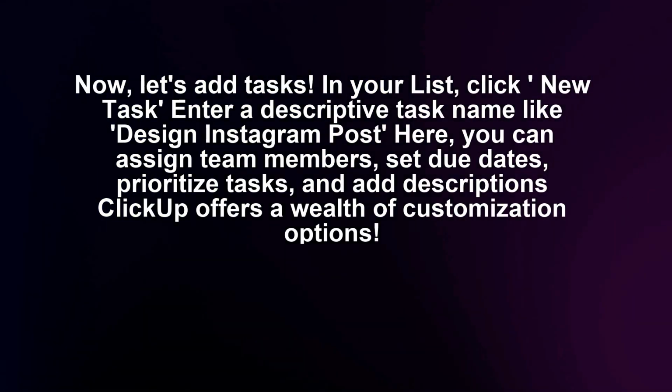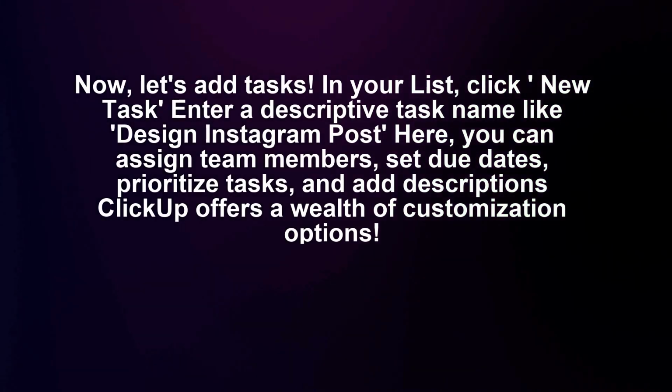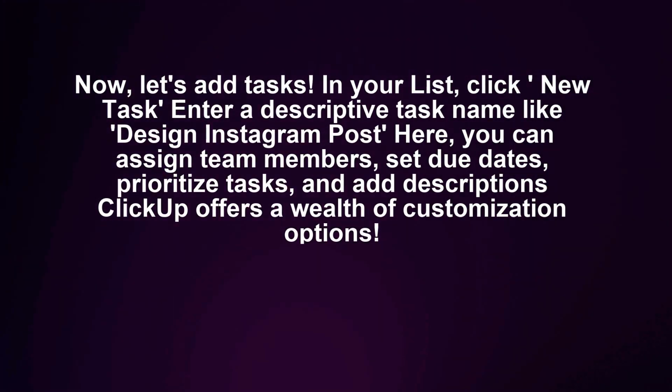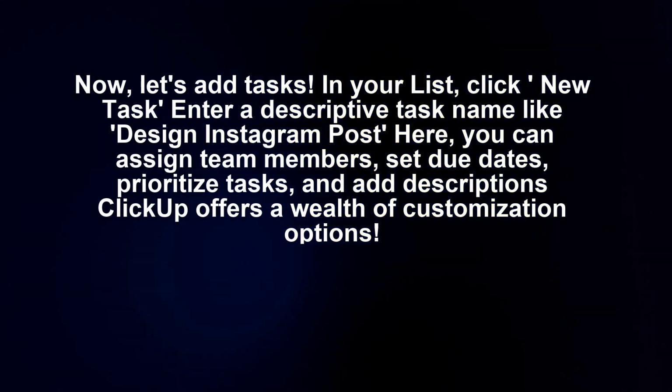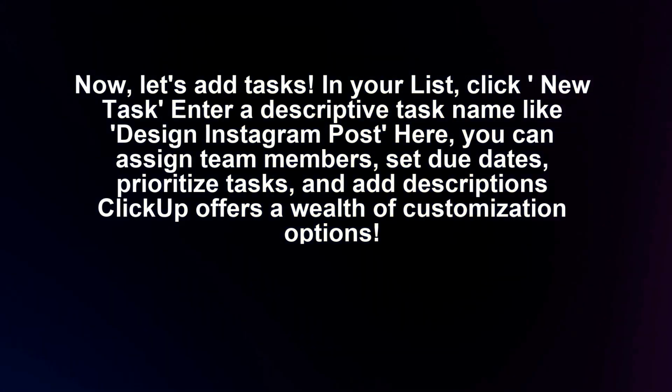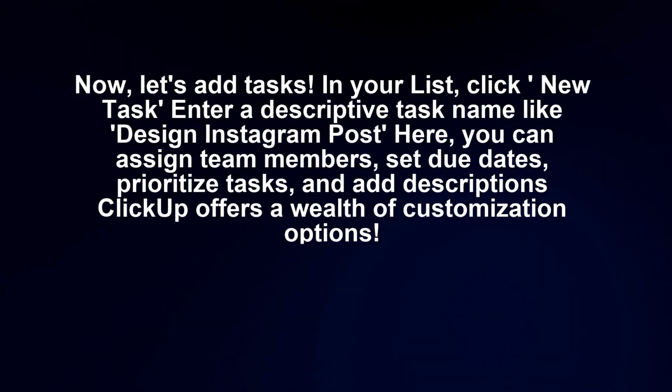Now, let's add tasks. In your list, click New Task. Enter a descriptive task name like Design Instagram Post. Here, you can assign team members, set due dates, prioritize tasks, and add descriptions. ClickUp offers a wealth of customization options.